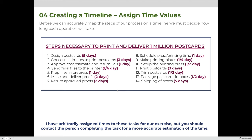An entire day for them to figure out when they can schedule us for press. A quarter of a day to make the printing plates, half a day to set up the press, three days to print a million postcards, half a day to trim them, half a day to pack them in boxes, and five days to ship from our location to Des Moines, Iowa. When estimating these times, you need accurate values — consult the people doing the work, and when in doubt, overestimate to create buffer time, but don't go overboard or you'll lose jobs.